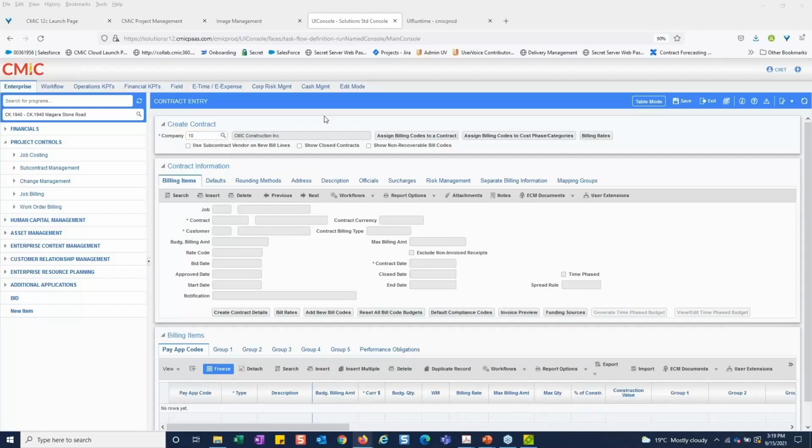to go. If you have some different jobs or different customer requirements and they want to see different backups on that report, then yeah, you'd have a different album. But once you've done it once, you won't have to create a new album each time. And so every time I do a billing backup, I always just use the same album. It has the selection criteria, search criteria defined, and that pulls everything in for me automatically. It's really album is equal to report, which is equal to selection criteria.